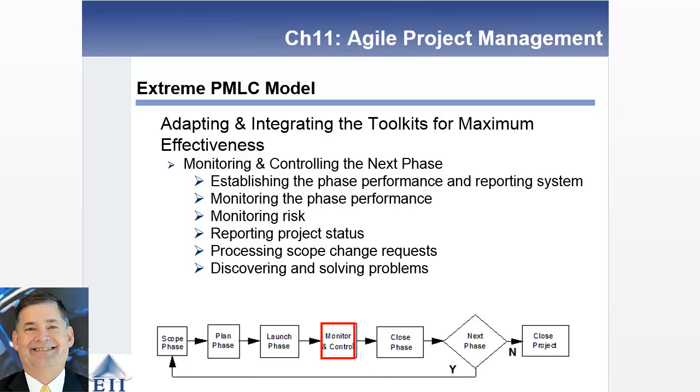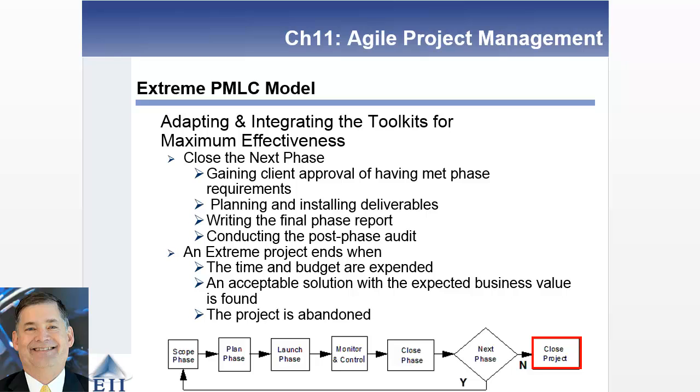And again, you should feel a little bit uncomfortable because you've got the solution. The question is, what problem does this map to, and how can I use this solution to add business value to my particular company? Finally, you come to the closing, and it's very similar to what we've done previously. During the close phase, you have to decide, or the client has to decide, whether you're going to move to the next phase and do this loop again, or you're going to release an intermediate project or solution, or you're going to close it out and abandon the project. Sometimes you're going to run out of time and budget, and in that case, you're going to close it out as well.